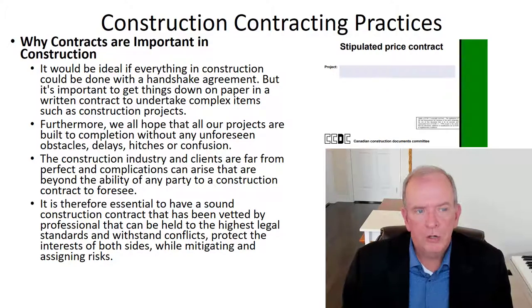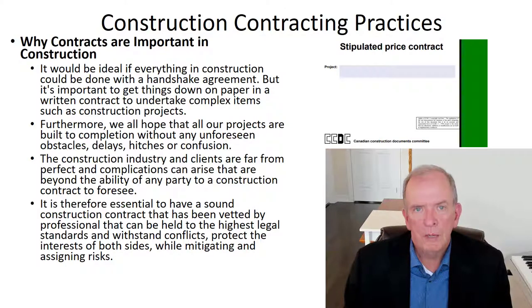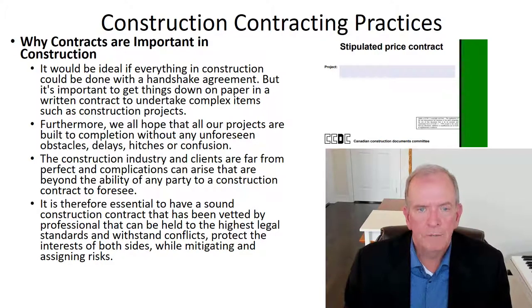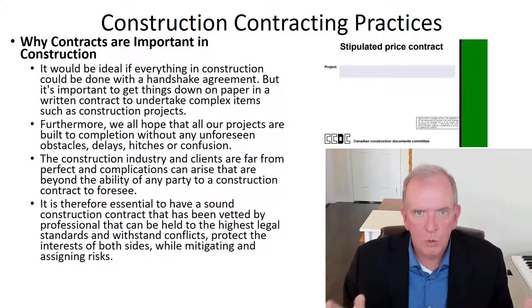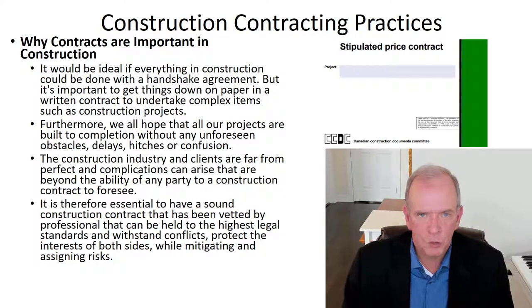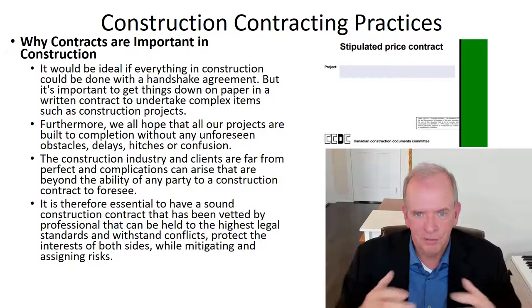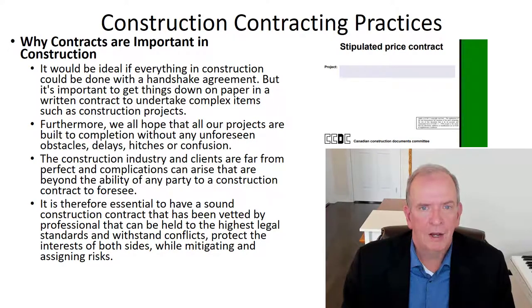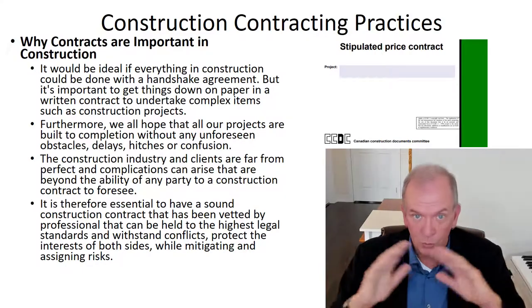Why construction contracts are important: in Canada, we use CCDC documents — the Canadian Construction Documents Committee. A typical CCDC2 contract is for a lump sum type project, where the buyer wants to know exactly what it's going to cost before entering into an agreement. It's a pretty common type of contract, although it's been getting less common in recent years because of the complexity in construction projects. The lump sum price can be undermined when you have to make many changes because the scope wasn't well defined.